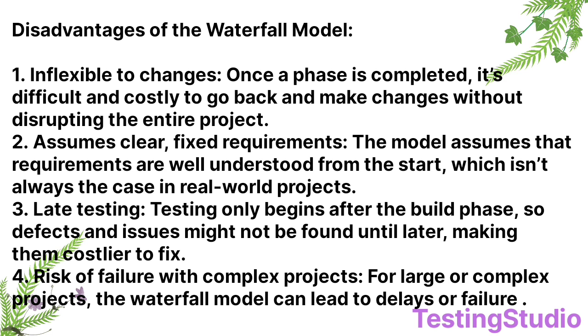Now we will see disadvantages. First, inflexible to changes. Once a phase is completed, it's difficult and costly to go back and make changes without disrupting the entire project. Second disadvantage is assumes clear and fixed requirements. The model assumes that requirements are well understood from the start, which isn't always the case in real world projects.